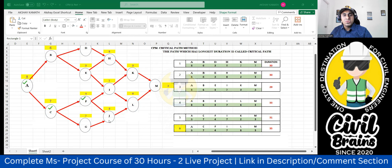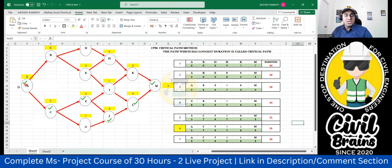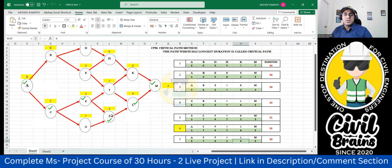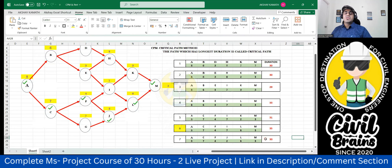Another path: after reaching F, I go to J instead of I. From J I go to L, then M. Path: A → C → F → J → L → M. Durations: A = 8, C = 7, F = 4, J = 2, L = 6, M = 3. Total: 8 + 7 + 4 + 2 + 6 + 3 = 30 days.